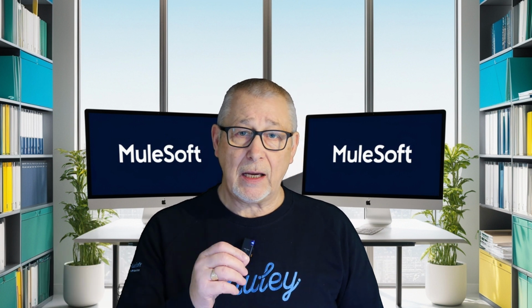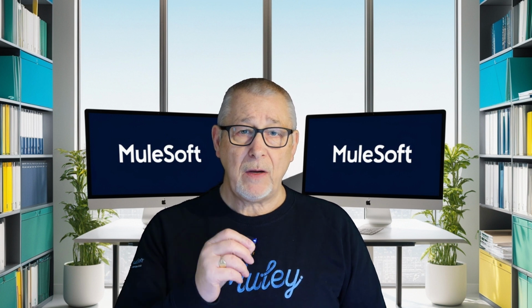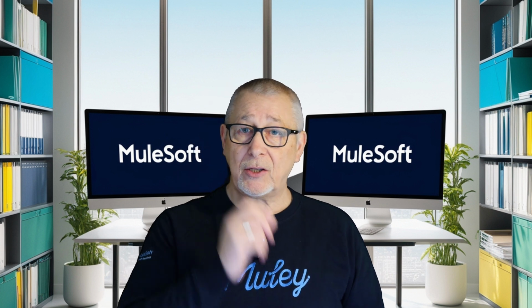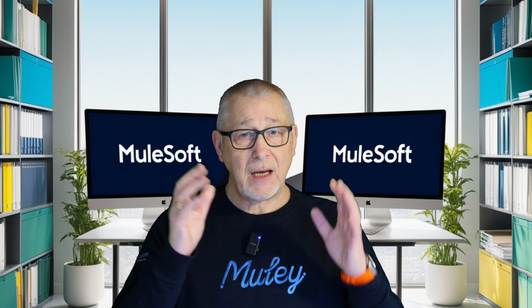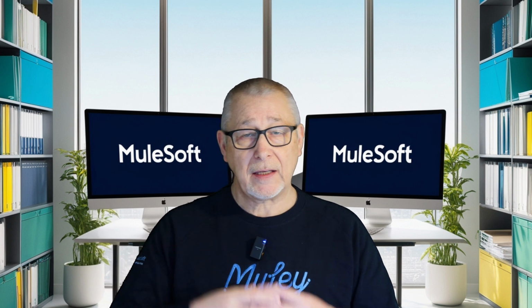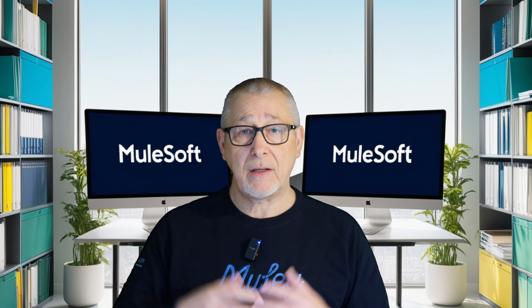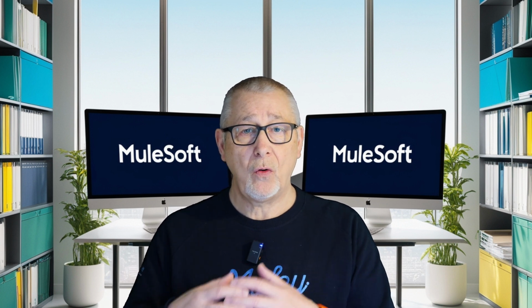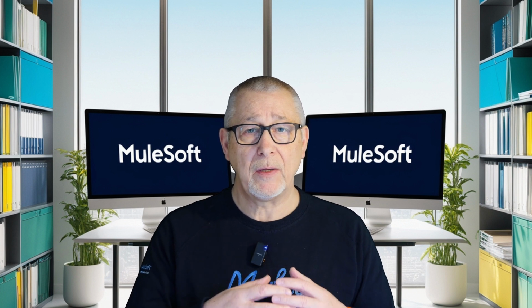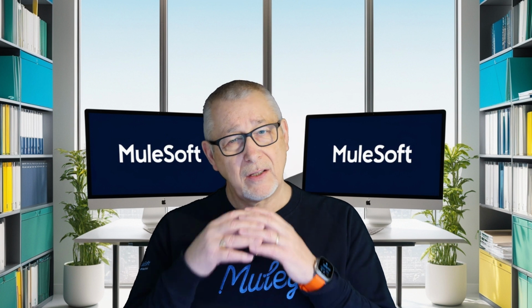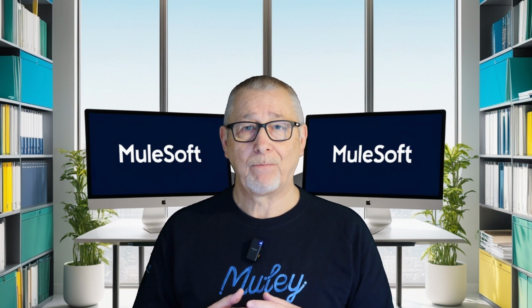But a word of caution here, you need to be really clear about defining the boundaries between optimization and scope creep, especially in a consultancy type environment, because obviously that will depend on finance again to extend, if the business desires, the actual engagement. Now, optimization improves what you already have, whereas new requirements drive a change of scope and are very different things with sometimes a fuzzy boundary.